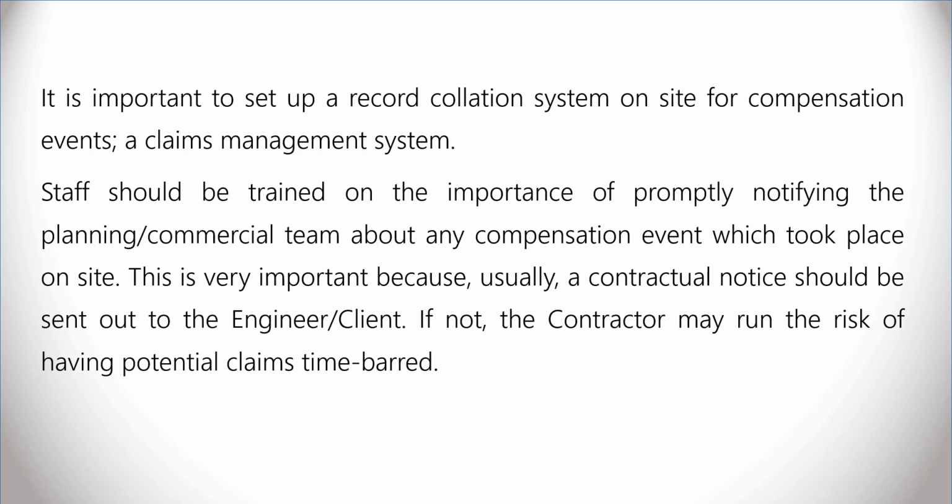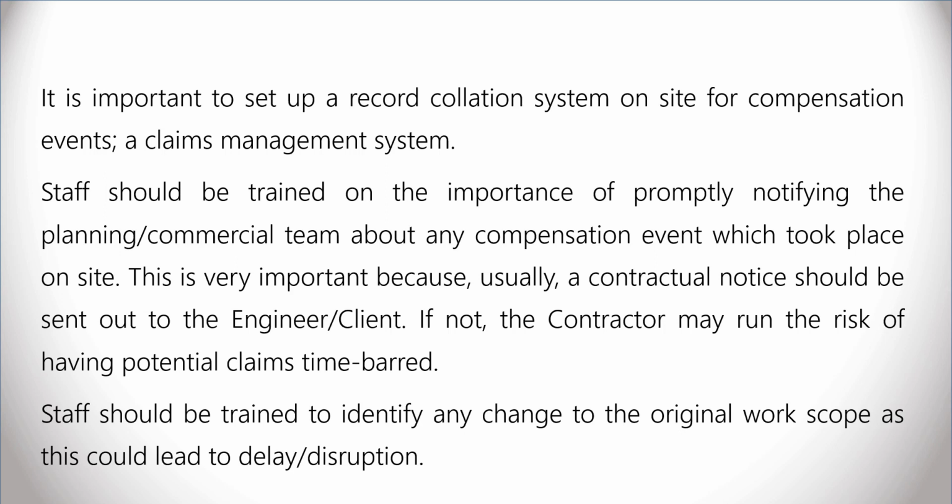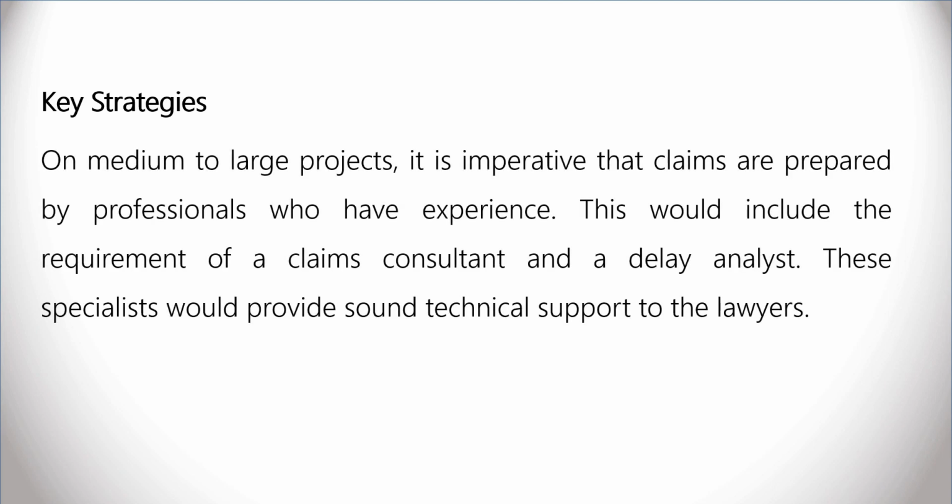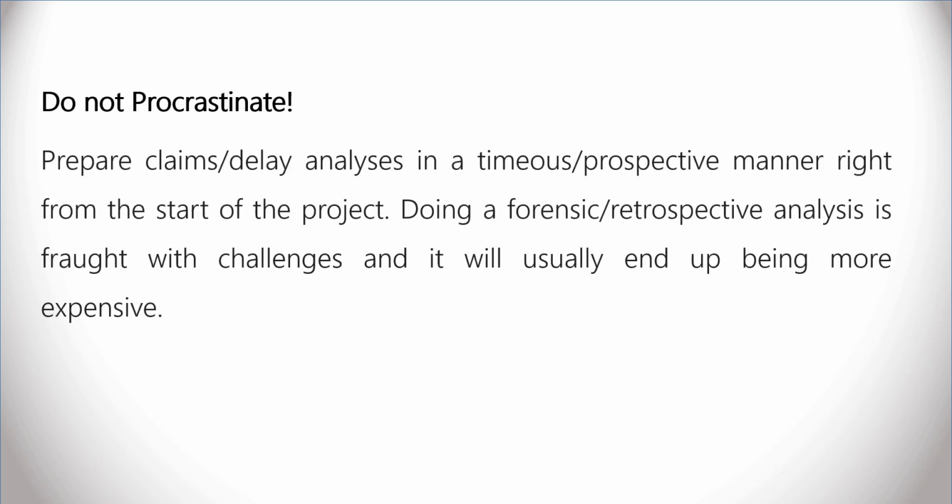Staff should be trained to identify any change to the original work scope, as this could lead to delay and/or disruption. On medium to large projects, it is imperative that claims are prepared by professionals who have experience in this field. This would include the requirement of a claims consultant and/or a delay analyst. These specialists would provide sound technical support to the lawyers. Next, do not procrastinate. Prepare claims and delay analysis in a timeous, prospective manner right from the start of the project. Doing a forensic, retrospective analysis is fraught with challenges, and it will usually end up being more expensive.